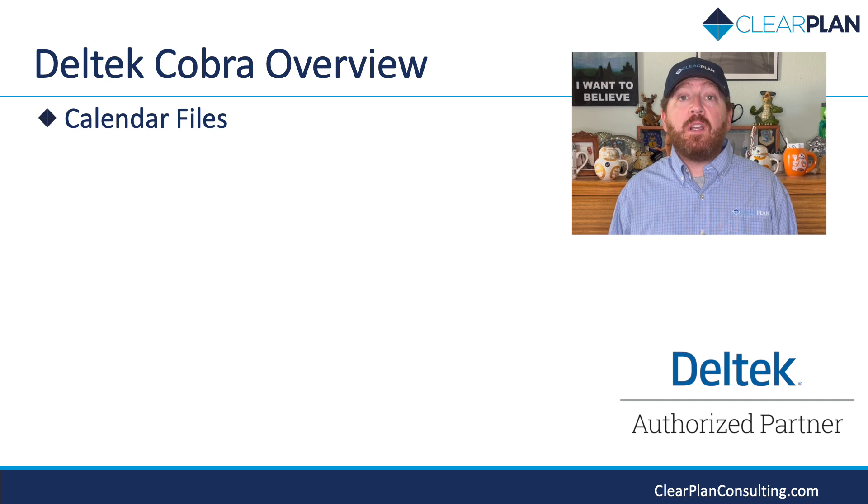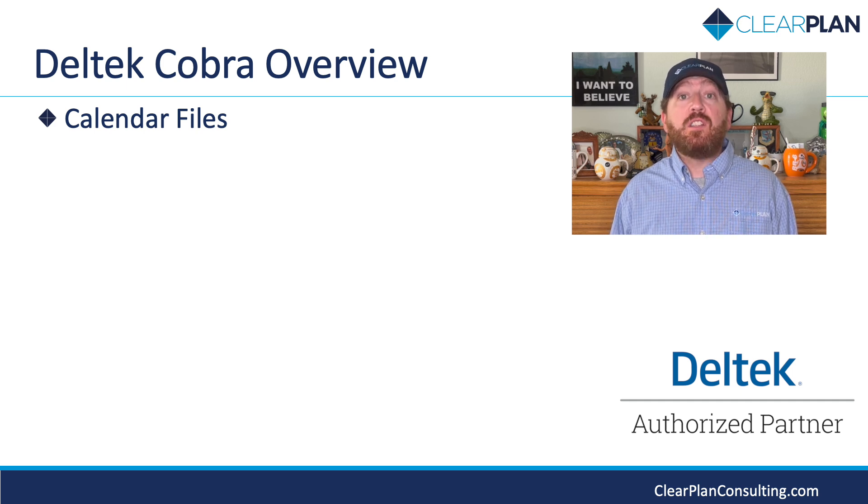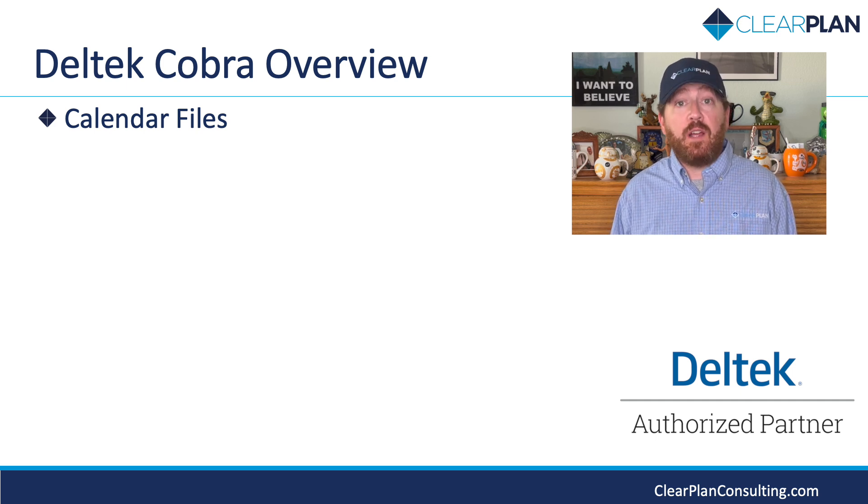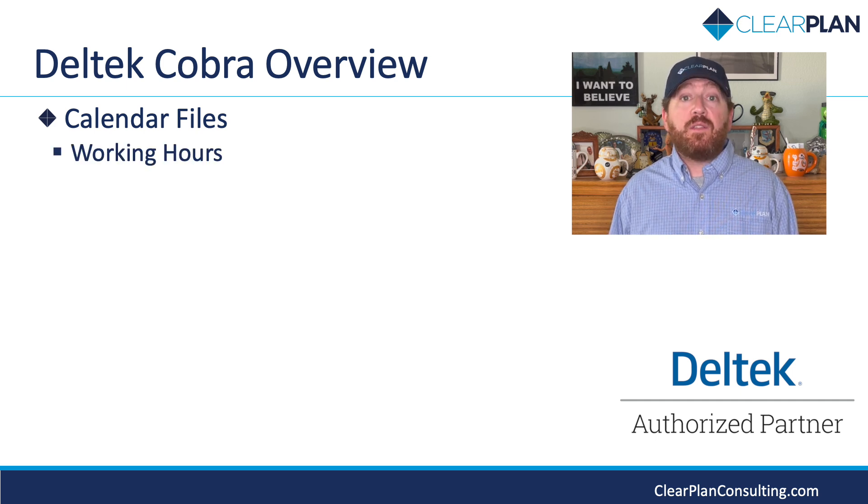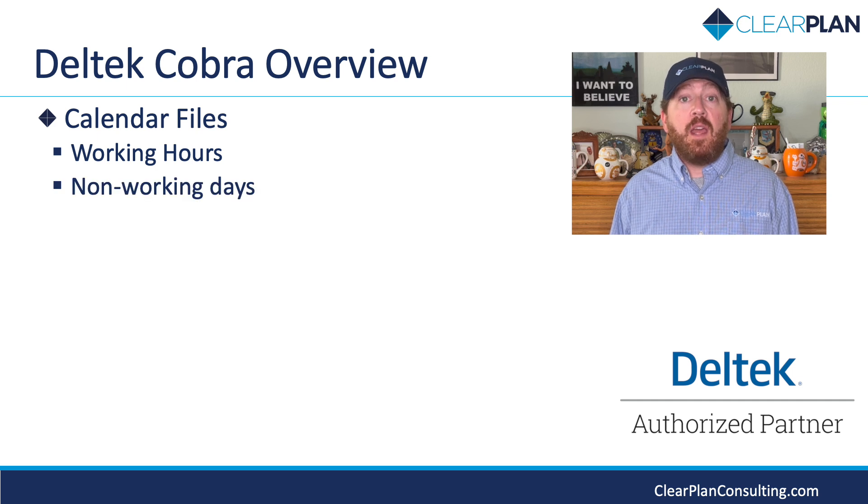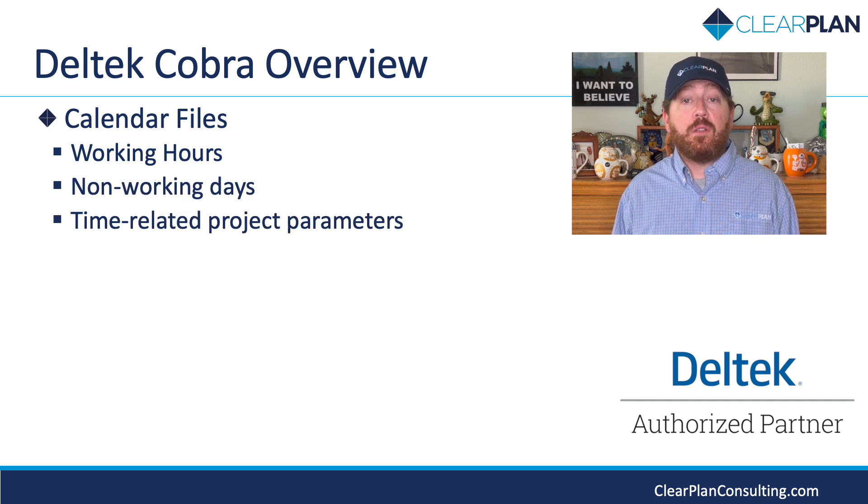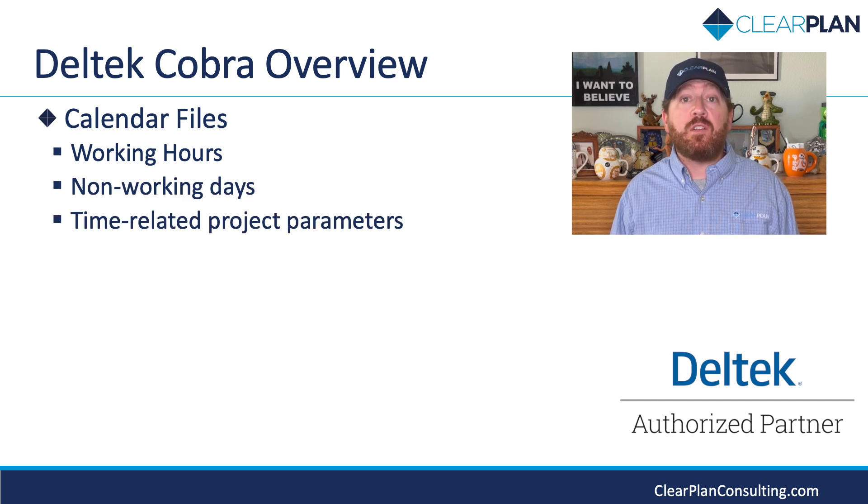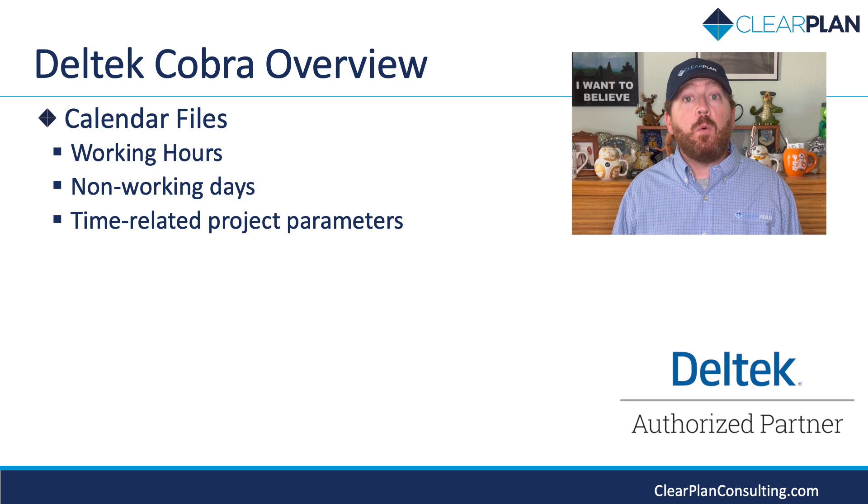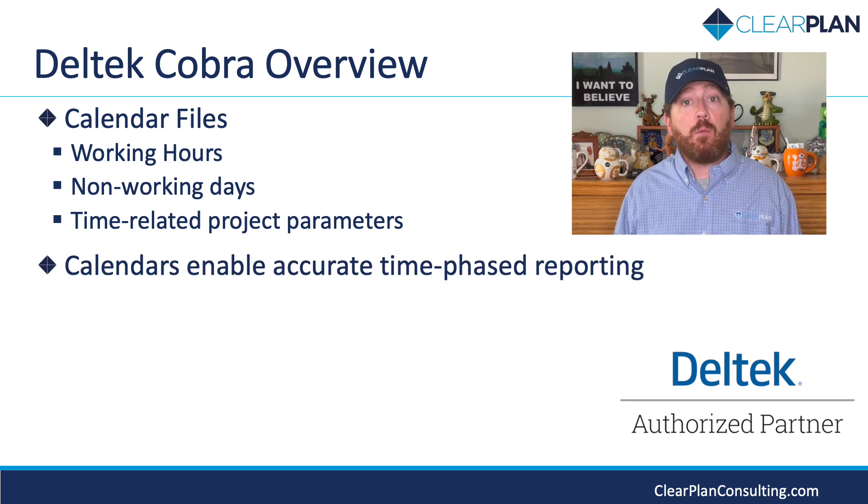One fundamental aspect of Deltek Cobra is its use of calendar files. These files define working hours, non-working days, and any time-related project parameters. Ensuring your calendar is set up correctly will allow accurate reporting.